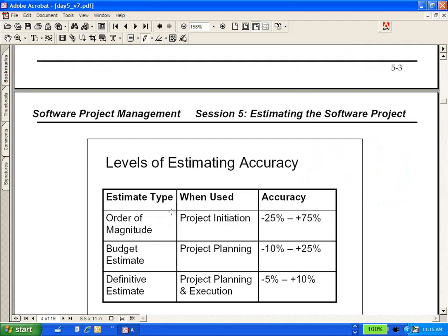Okay, let's see, where are we? As you go through the project, as you go deeper and deeper into your software development life cycle, page 4, your software estimation accuracy becomes better and better. Makes sense, right? When you haven't even built a house, you can say it's going to cost me 2 crore rupees. After you buy the land for 1.5 crores, then you say, oh, no, I don't think it'll be 2 crore anymore, I'll say 2.5 crores. After you put in the foundation and the structure, oh, 2.5 is already gone, it will be 3.5. But as you go closer and closer to the actual house, you have better and better estimation. Same thing with software projects.